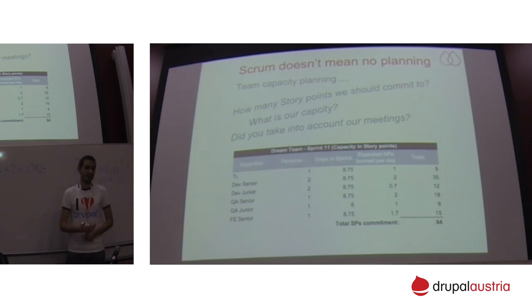But when you have communication, it might be a situation where the team is not committed to this number because of some previous historical data. They can come to you and say, you remember last sprint, our estimate wasn't accurate and we need to revise the story points given for the user stories. Then obviously you should listen to these guys, because they should believe in the story points given and committed.